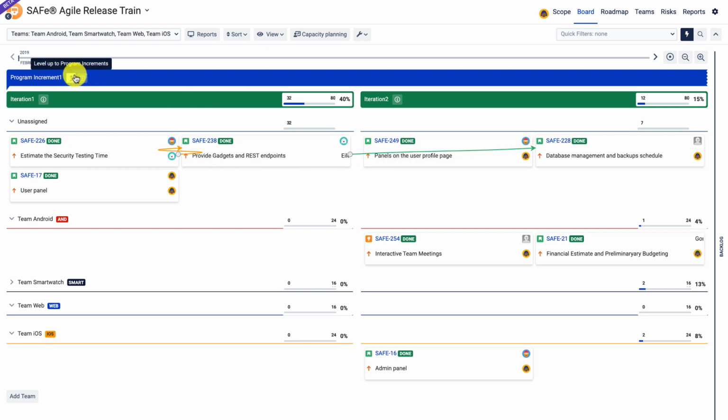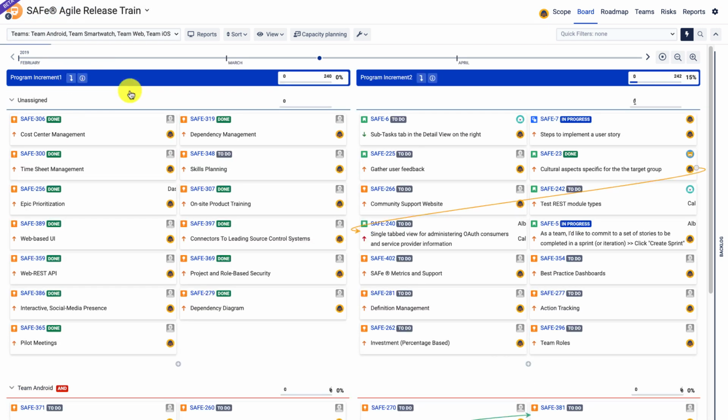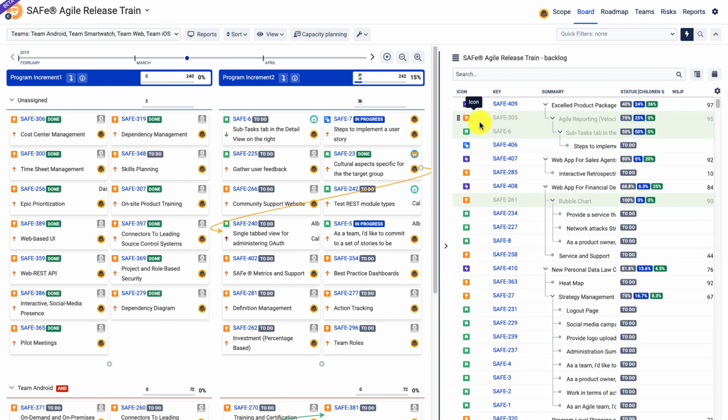So how does this work? We do have a published white paper on PI planning using the Scaled Agile Framework. So in general, we will start with a backlog full of features, and we will start planning our features, for example, using the weighted shortest job first as a criterion to select those that would bring the most value and would require the least effort.